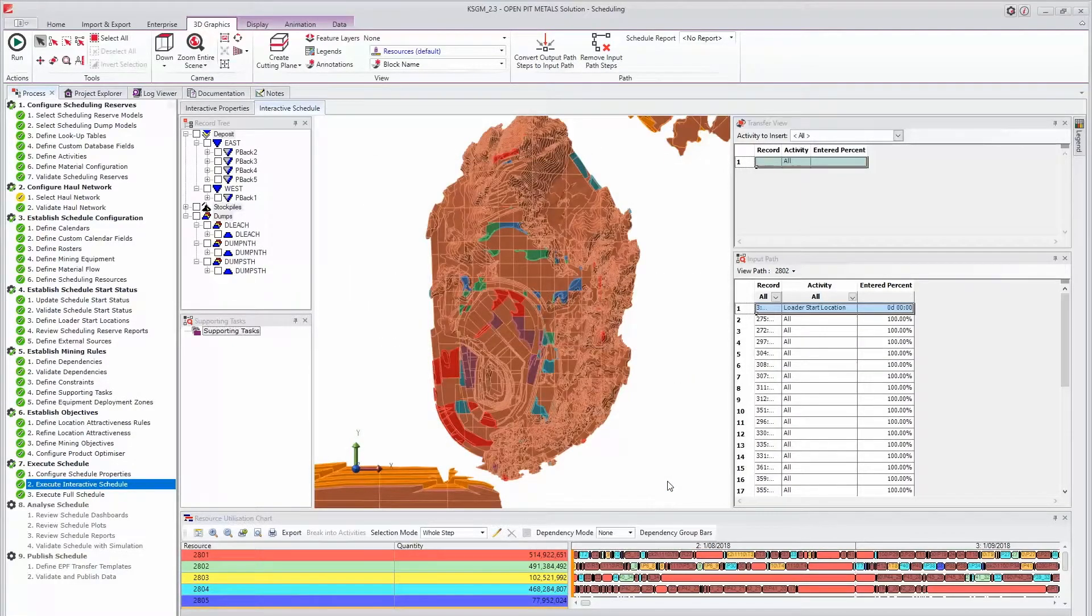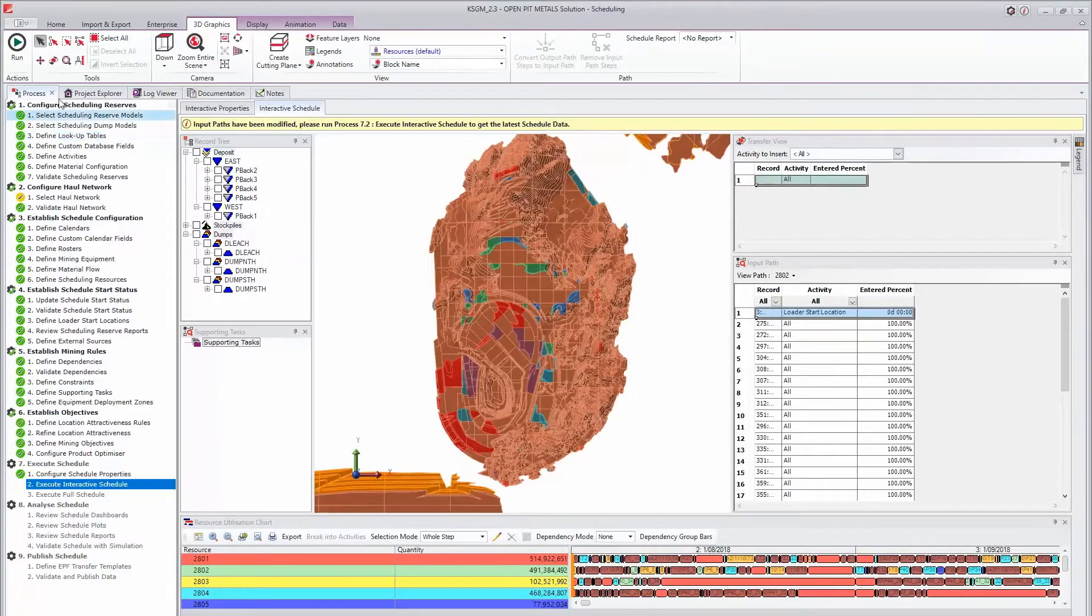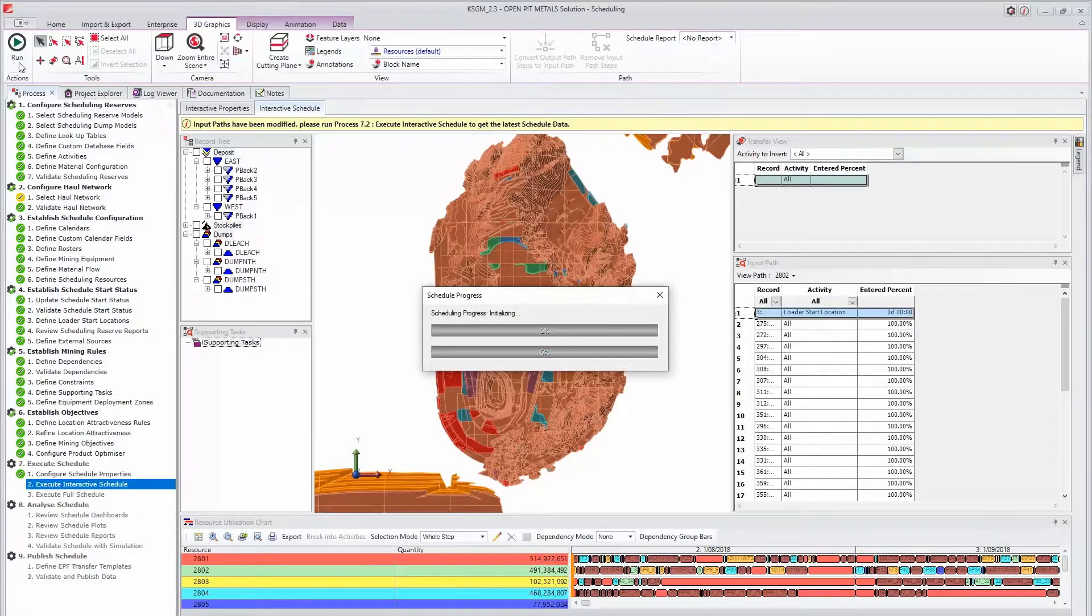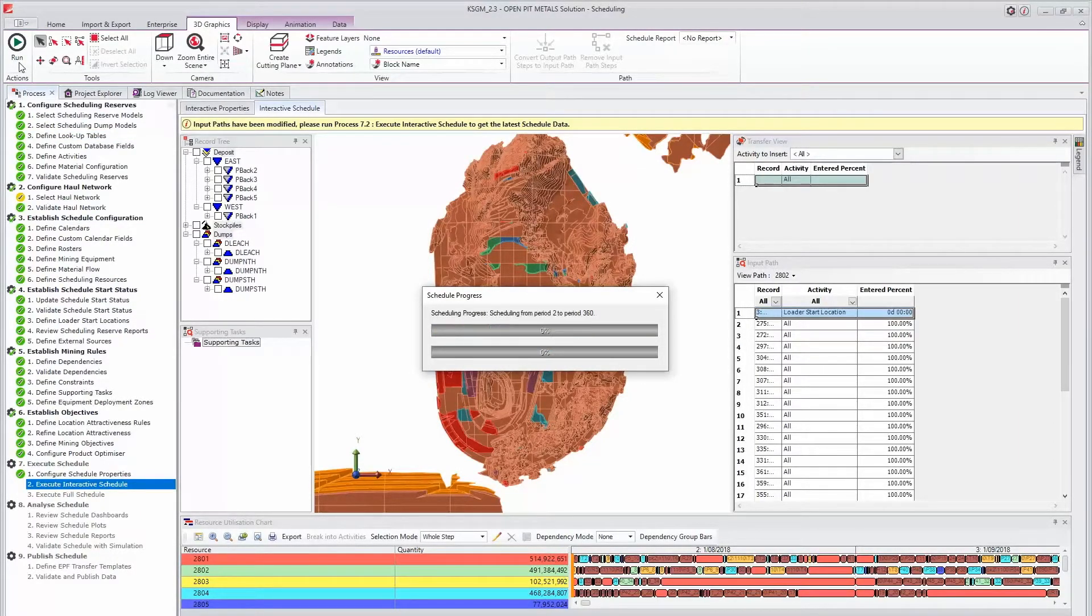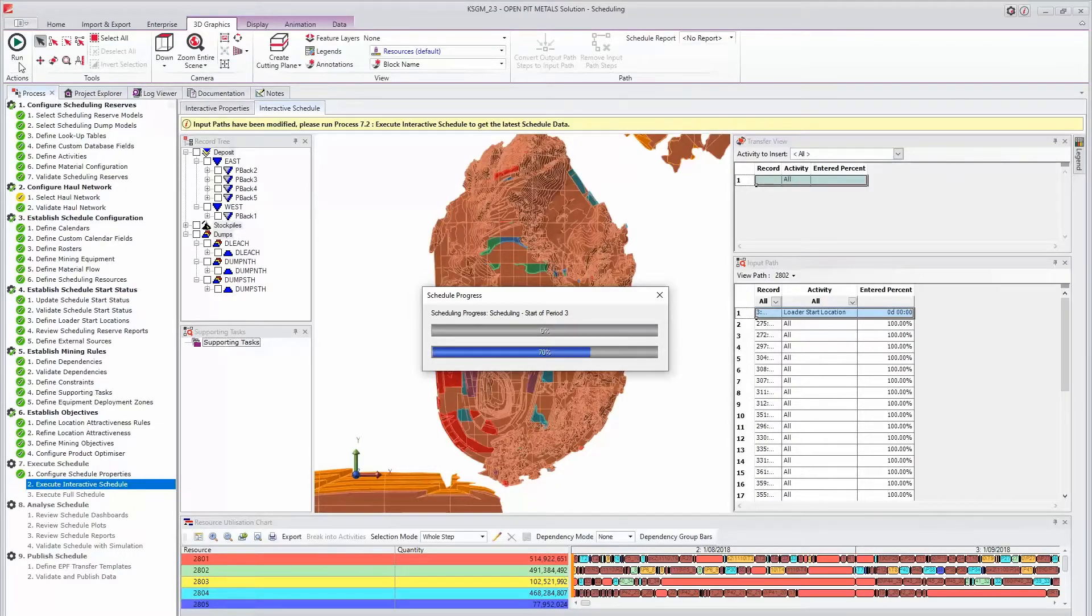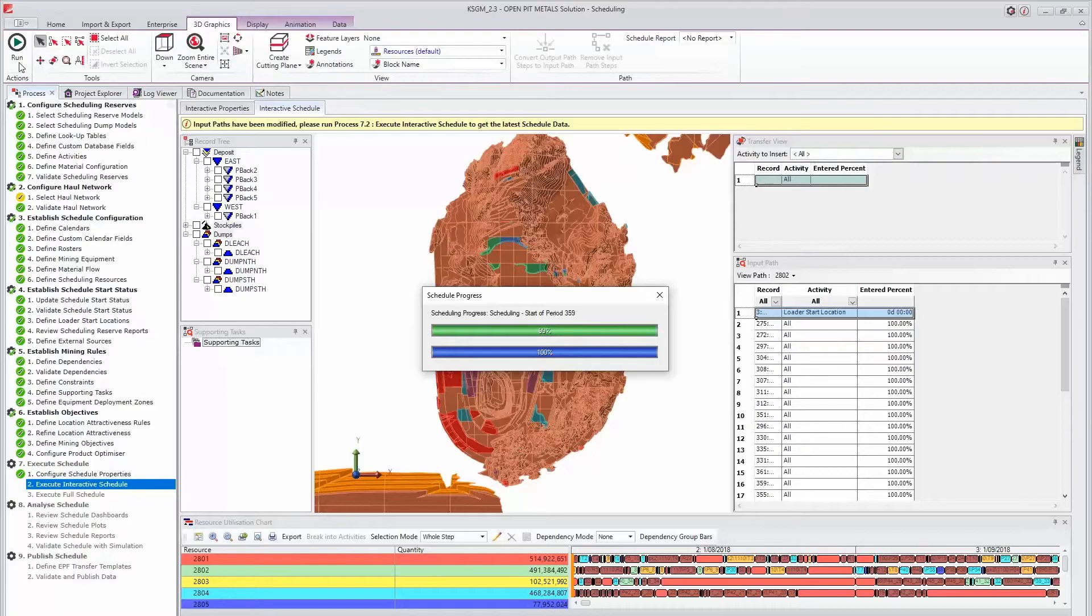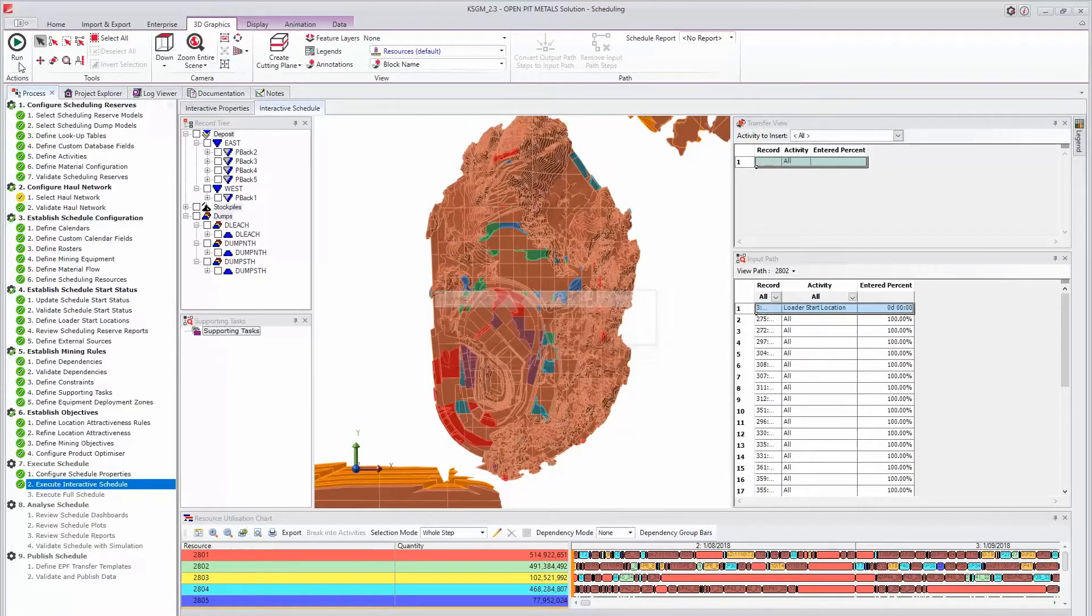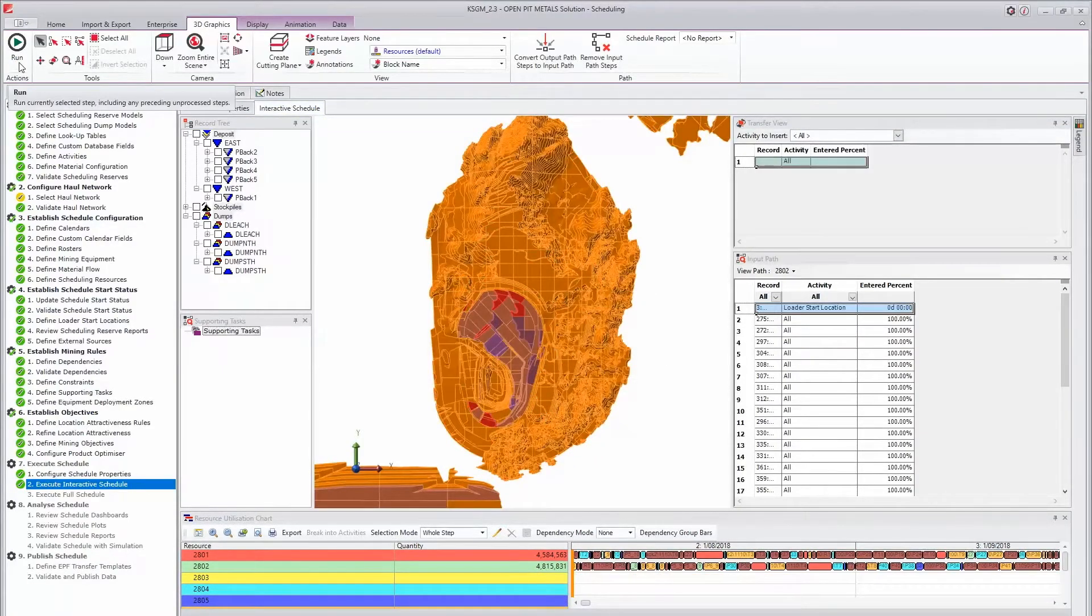Using this tool, you can convert the output paths for as many periods and resources as you wish. Once the conversion is complete, the input paths for the selected resources will be populated. Running the step will update the interactive schedule plot accordingly.